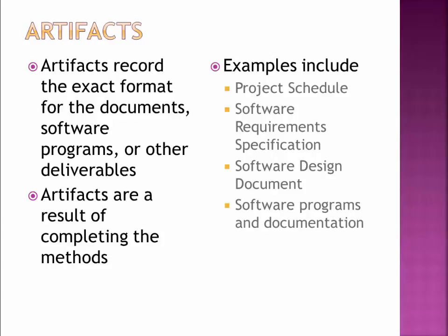The artifacts are what I walk away with. It could be the project schedule. It could be the software requirements or the design. Code is a definite artifact that gets created. You might not think of it as such, but it's a document that gets created. Test plans are one thing. The planning phase is one activity, and a different activity is actually executing the test. Off of executing the test, I have bug reports, test results, and approval letters saying yes, we all agree that this project is ready to go. All those things are artifacts that ideally are formalized and captured by the process.